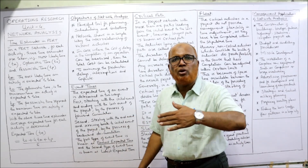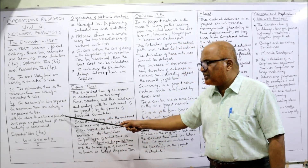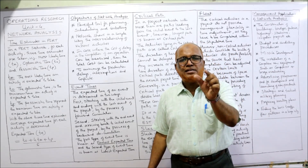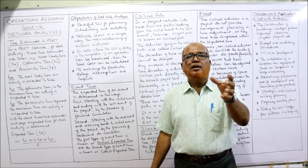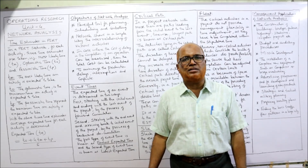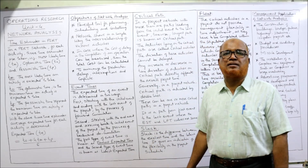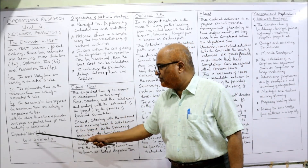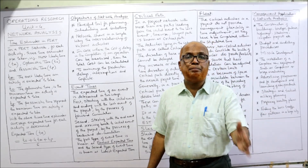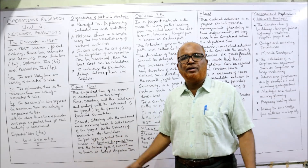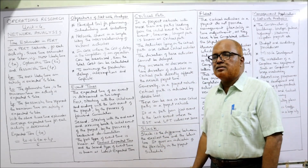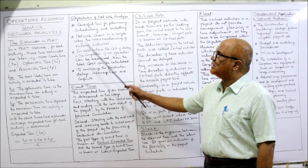Pessimistic time TP is the maximum time required to complete an activity. So: most likely time, optimistic time (shortest possible), and pessimistic time (longest, maximum time). With these three time estimates, the average expected time for each activity can be calculated. The formula to calculate expected time TE is: TE = (TO + 4TM + TP) / 6. Using this formula, we combine the three time estimates into one expected time.